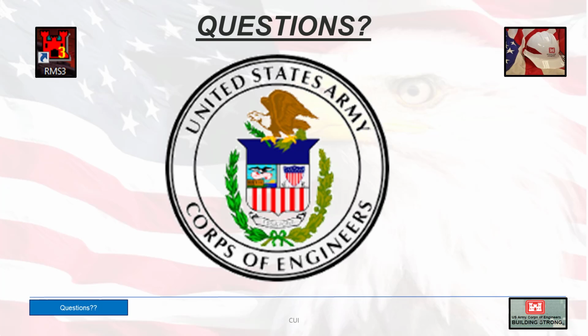Hey, Jennifer commented, saying, so we will no longer be able to sign outside of RMS for the ENG 93? If you sign outside of RMS for the ENG 93 and upload it into RMS and check the box that says it's manually signed, then you should be able to do it that way.